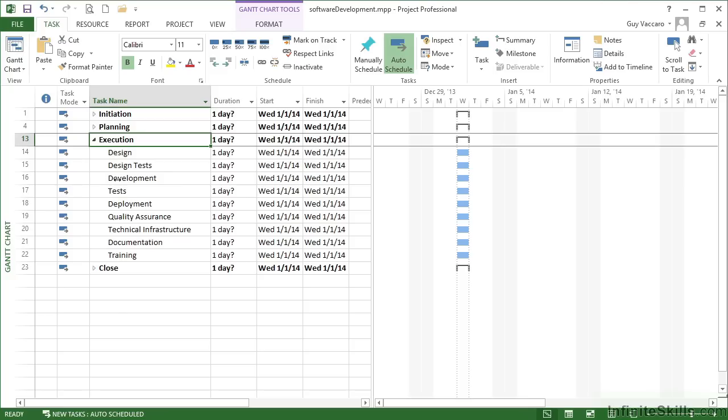We've added in the sections within those phases by inserting them below the phase heading and then indenting them once, so they become subsections for that particular phase. All of these items are subsections for the execution phase. These themselves will become section headings for a series of individual tasks, and that effectively is the next step.